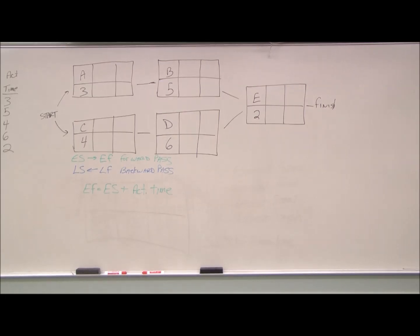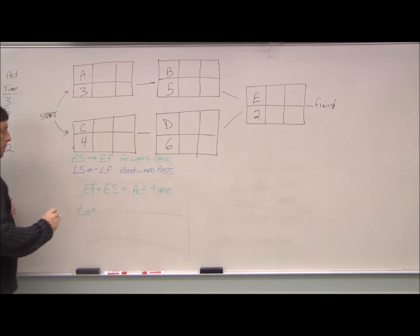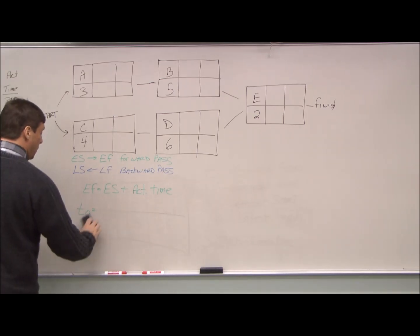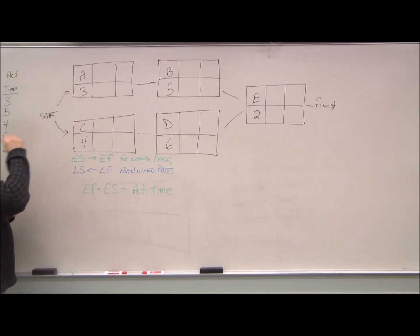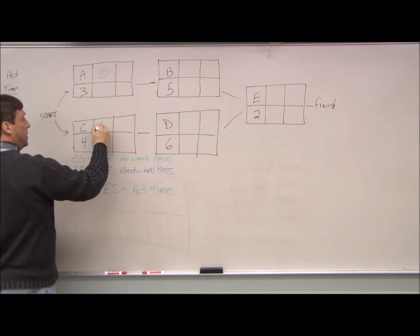Let's start looking at our earliest start to begin with. Typically, in engineering terms, projects begin at t equals zero, or zero time. So we start, we have two elements we can start with here at A and C. Both start at zero time.